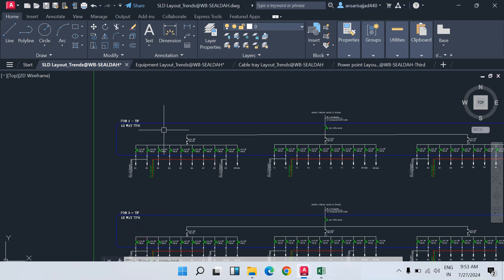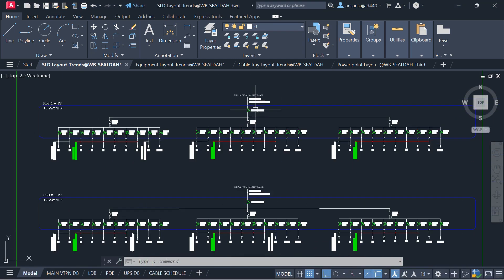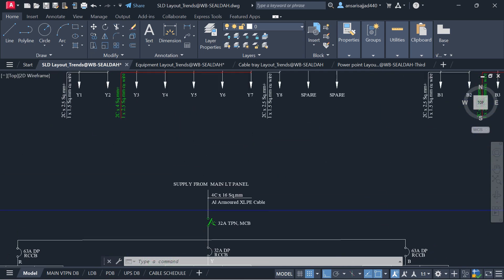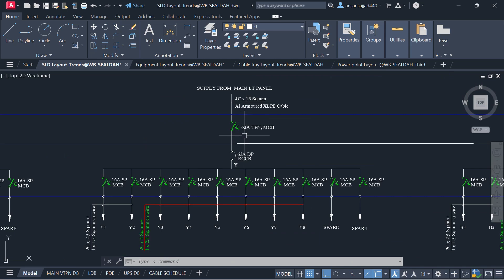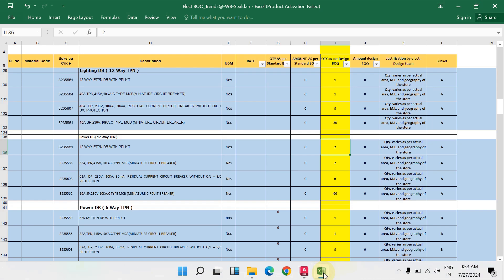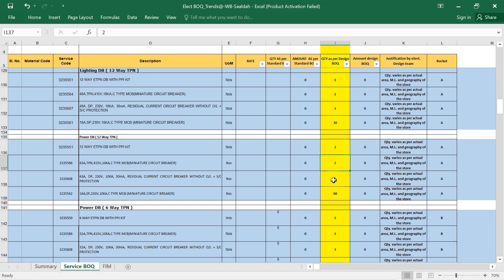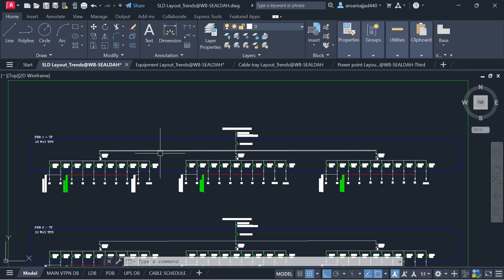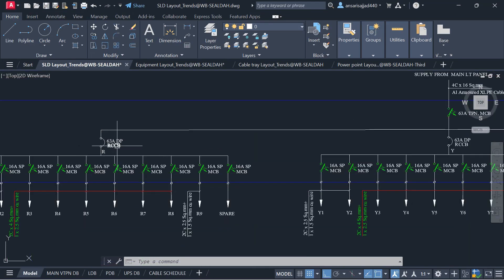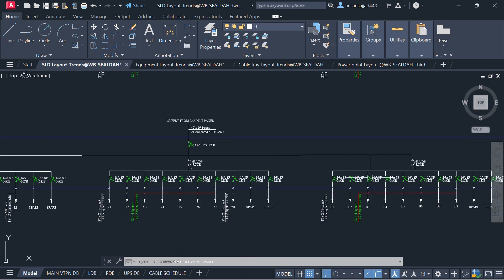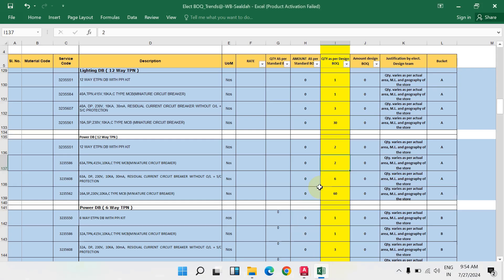For the 63-amp TPN MCB: one is here and one is here, so total 2 — write down quantity 2. Then for the 63-amp double pole RCCB: 1, 2, 3 here and 4, 5, 6 in the other board — total quantity I have written is 6.